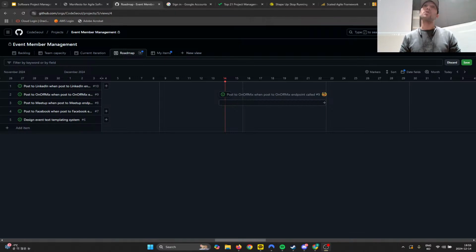to test. Oh, so they serve more than one team. Yes. Okay, that's a problem. So ideally, you want a QA person dedicated to a specific project and a specific team, because otherwise you can't predict.